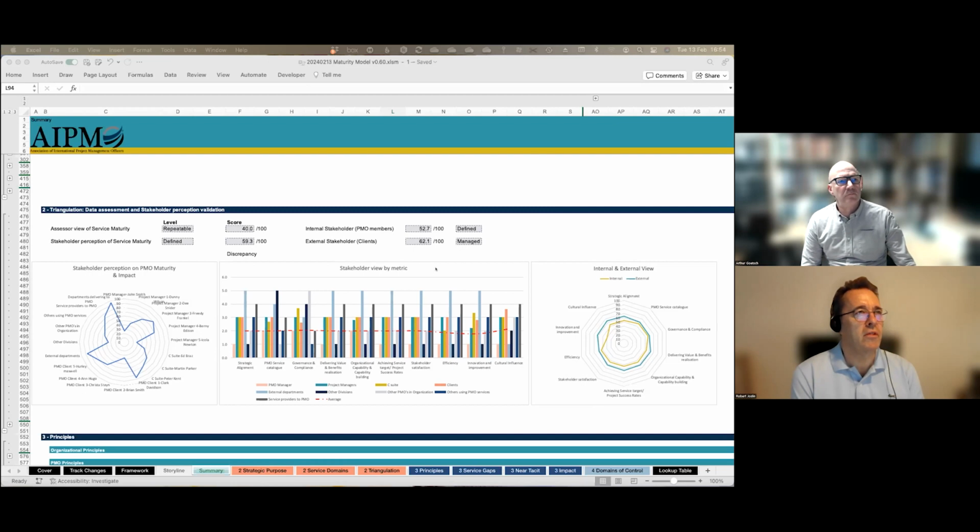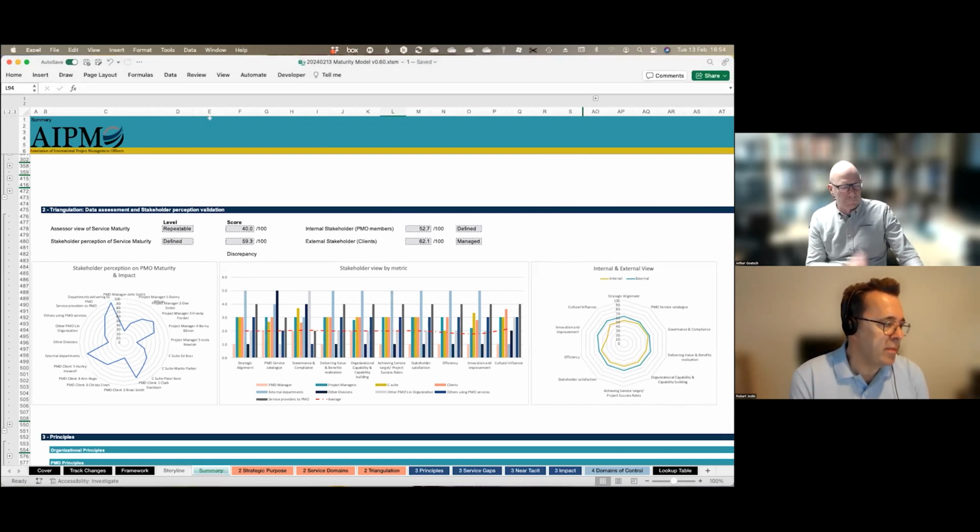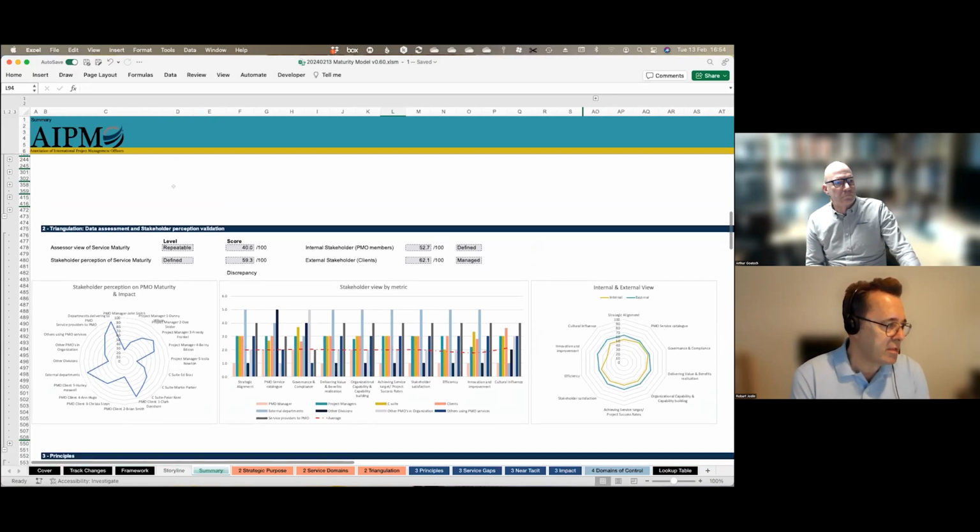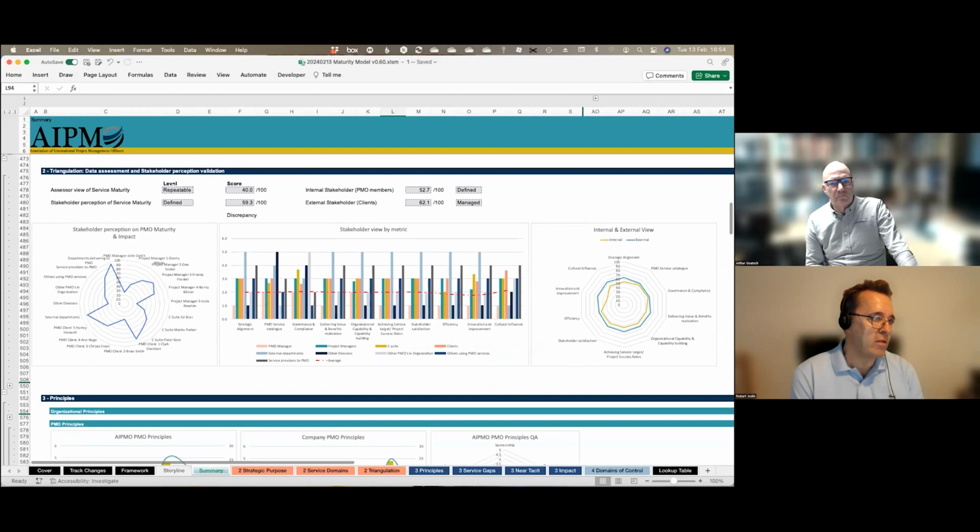when we have a methodology for how we actually look at root cause analysis, which is also done on the course. And invariably what happens is that the PMO is suffering from what we call a type 1 or type 2 error. Type 1 is when they're doing it but not properly. So maybe it's a service they're actually doing that's not properly implemented, not meeting the service targets, or type 2 is they're actually offering things that are not required at all. And so therefore they're wasting time and resources. So we actually look into the root causes, and invariably we pinpoint where the problem is,